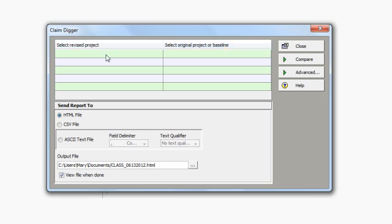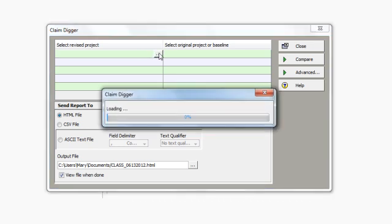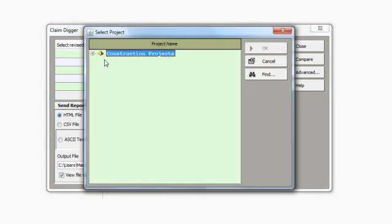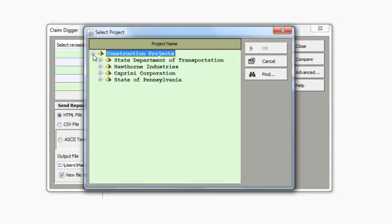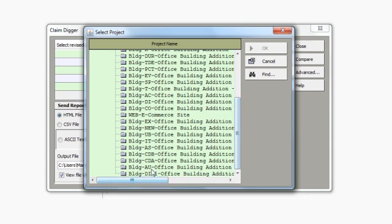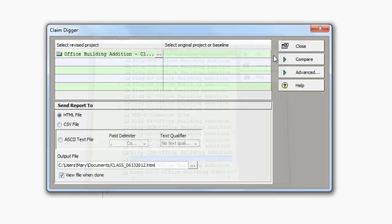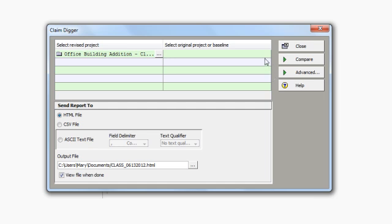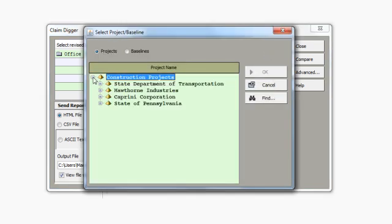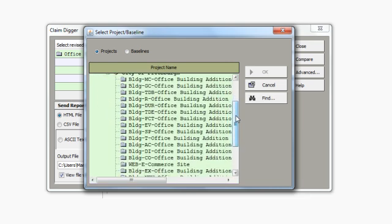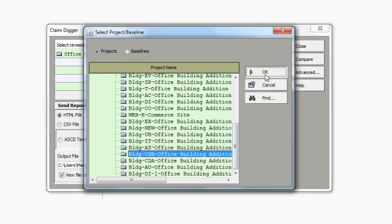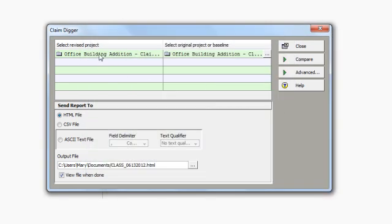So I'm first going to select the revised project that I would like to select, and I can see I've got my enterprise project structure. So I will drill down and locate the project that I would like to compare. And over on the right, I will select that same project or a copy of that project before I had any updates to the project. So the project on the left is a revised project after an update. The project on the right is the same project prior to the update.